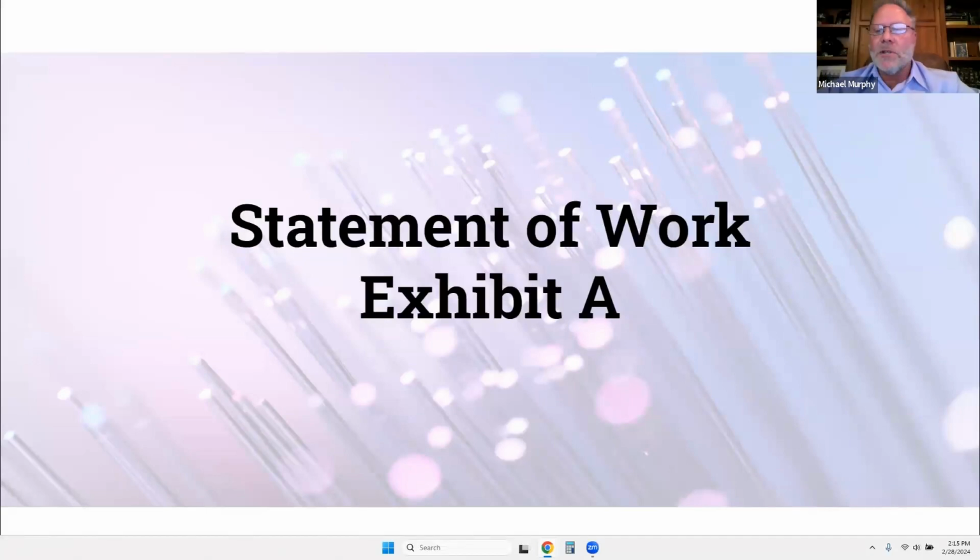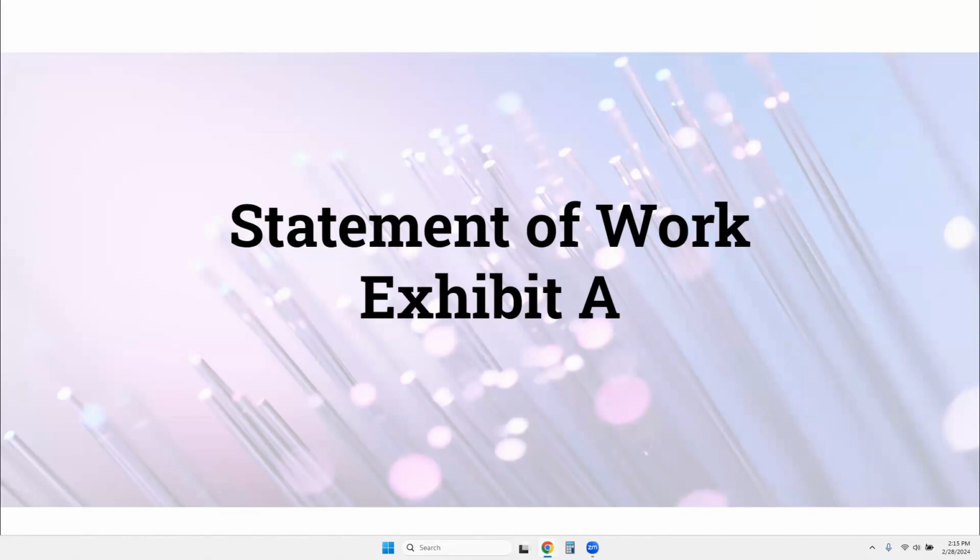Yes, we would give you a notice to proceed after receipt of that, and once the date of that notice proceed, you're good to go after that. Okay, so every single permit? Yes.